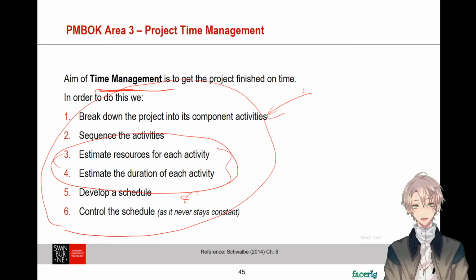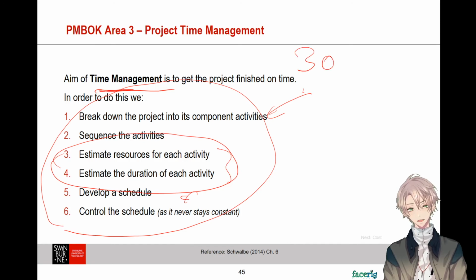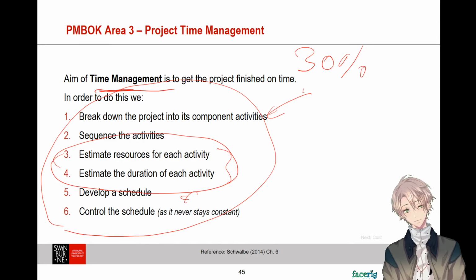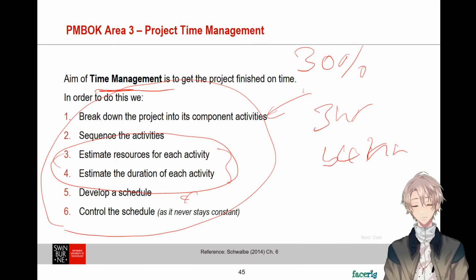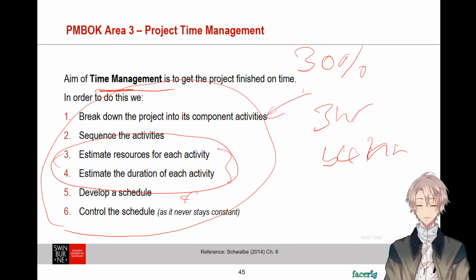The trick is to increase whatever you estimate by 30%. For example, if you think the work requires 3 hours to do, you make it 4 hours. Alright? Maybe 5 hours, who knows, okay? Just add what we call padding time or buffering time.